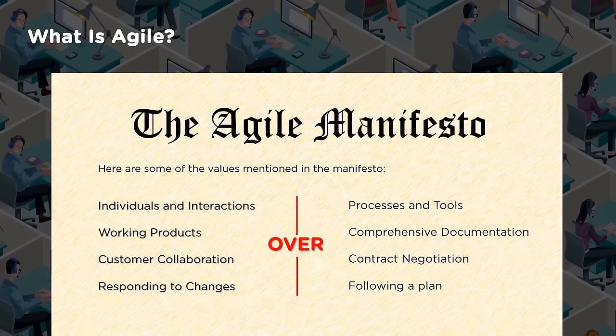So that during the collaboration, during the change, during the effort being put in, the customer is also informed what change is going to happen in terms of commercials as well as time and everything, so that it is documented in the contract and there is no confusion.